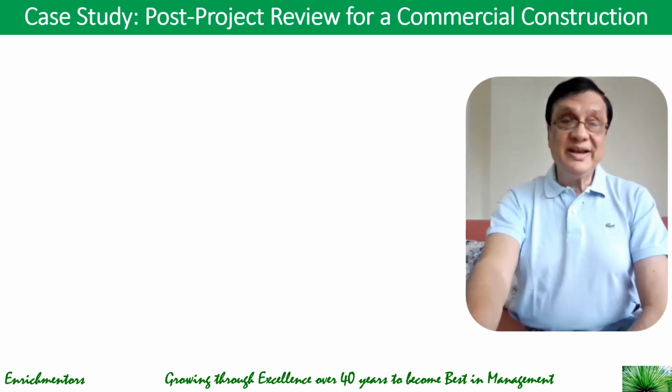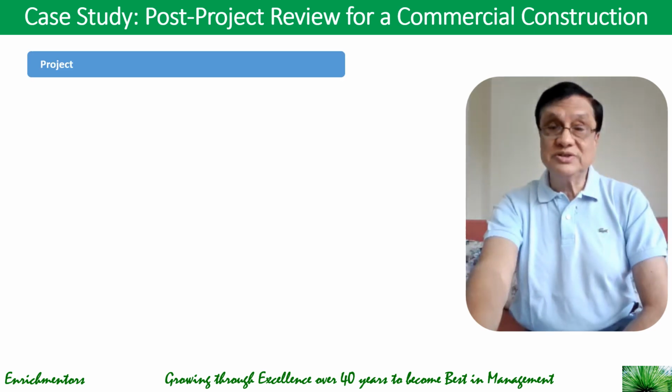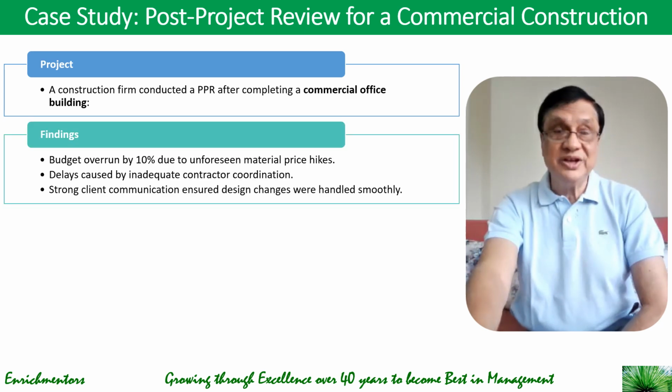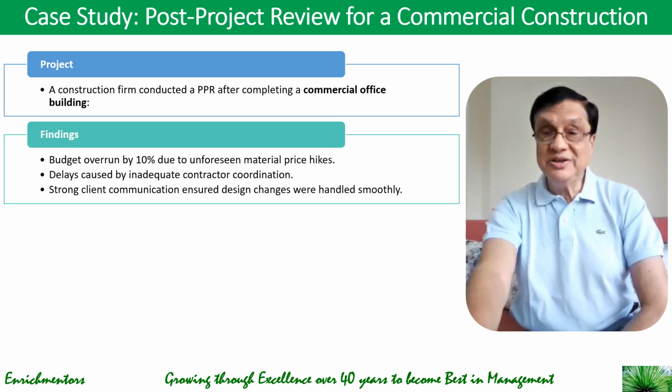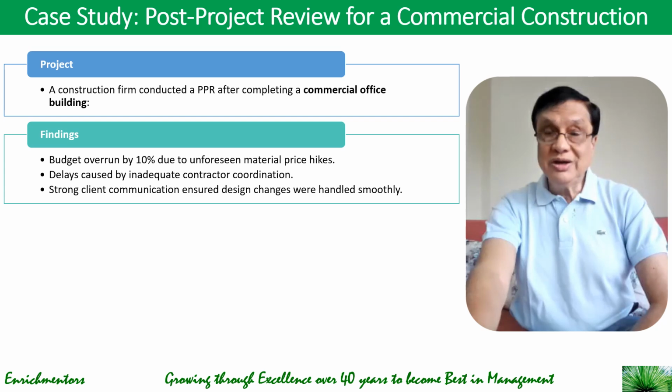So let's take a look at a case study of a post-project review of a commercial construction. Here the project was a construction firm conducted a PPR, post-project review, after completing a commercial office building. And the findings were that the budget overran by 10% due to unforeseen material price hikes, delays caused by inadequate contractor coordination, and strong client communication ensured design changes were handled smoothly. So two negatives, two things to improve, and one that went well.